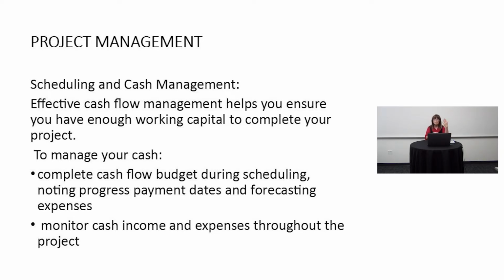At Lansing Linoleum, once a week, like clockwork. We're paying out a payroll. How are we going to get enough money to manage our payroll over a long project? You also want to monitor your cash income and expenses throughout the project. If the project is going to take 30 days, you want to make sure that on the 10th day of the project, you are taking a look to make sure that you're not going to run into problems with needing more cash before you finish the project.